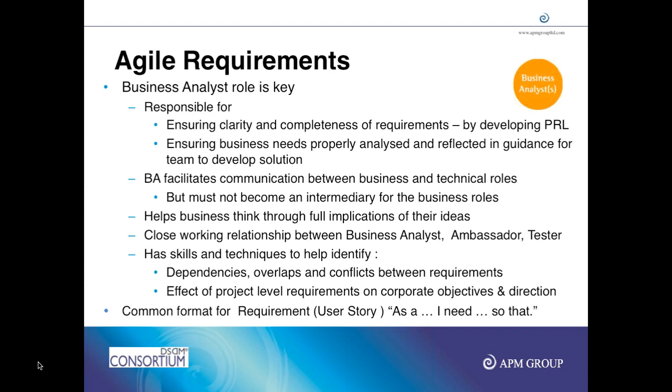But what may happen is, if the project has to run for 6, 9, 10, 12 months, the priorities decided during January may not remain true by say September or October. So what we do is periodically, that is either at the end of an increment or at the end of a time box, we check the priorities once again. Is it still holding true for us? Has something else come up? If something else comes up, we just write it in the prioritized requirements list. We do the sorting once again.